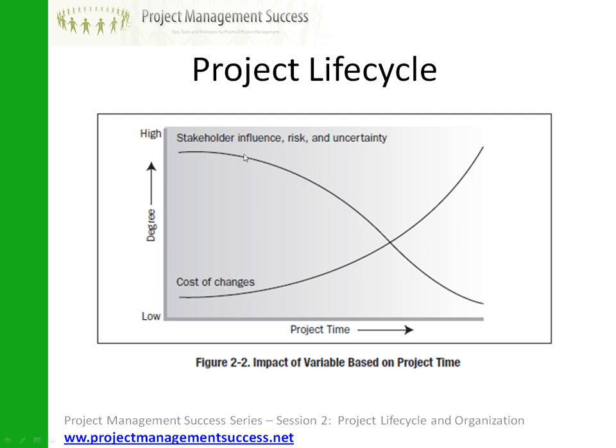If all your stakeholders are involved up here, then they drop off as you start to come across issues during your project and you need their input, but they're not around to give it to you. That can be a hard thing because at the end you front up with your deliverables, and they suddenly decide that what you've got isn't what they thought they were getting at the start, and that's because you made a whole bunch of decisions that they weren't involved in. So keeping that stakeholder involvement or engagement, particularly from the people who need to sign off on products, is important during that phase. But anyway, that's me just jumping ahead.